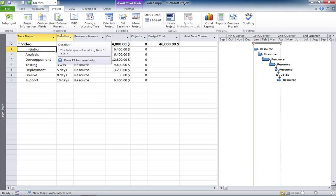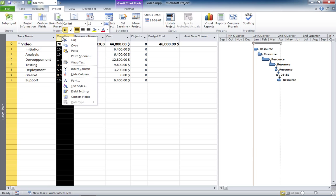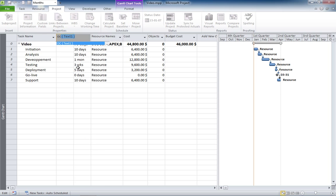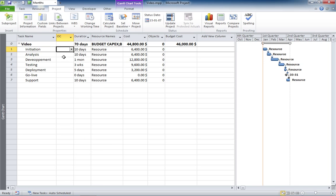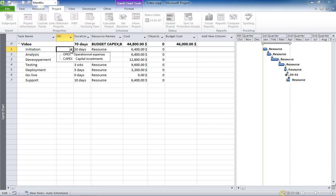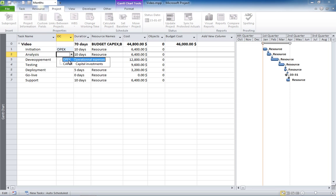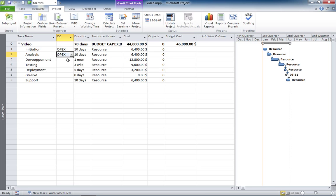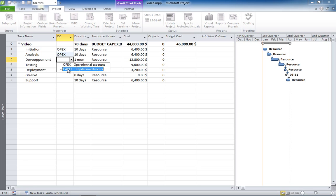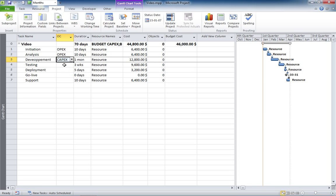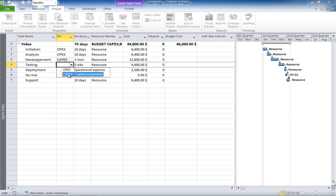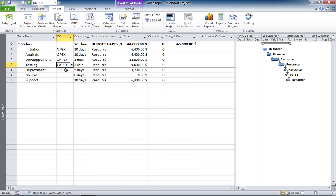Now, we're going to make that new field visible. Here you go. Now, the initiation is OPEX. You see the two values that I have defined here. Analysis is usually OPEX, but that depends on the opinion of your finance department. Development is usually CAPEX. Testing is usually CAPEX.